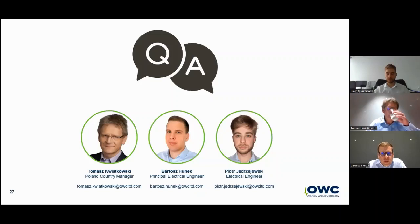Oh, I have one. I would like to pick up, maybe starting with Q&A. The question is, do the cost assumptions presented in the chart include steel material and substation fabrication? What are typical weights of an HVDC topside? Directly responding to this query, yes, the cost assumptions include steel material and its fabrication as well. I need to say that the transport and installation portion and onshore civil works were included as well.